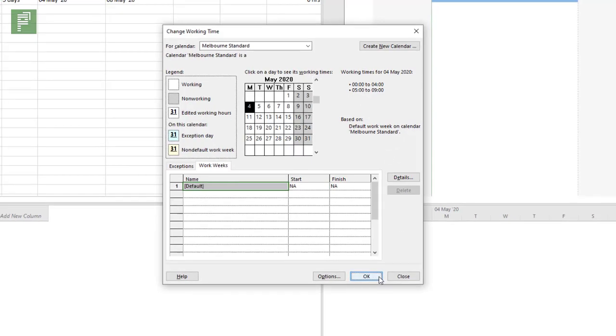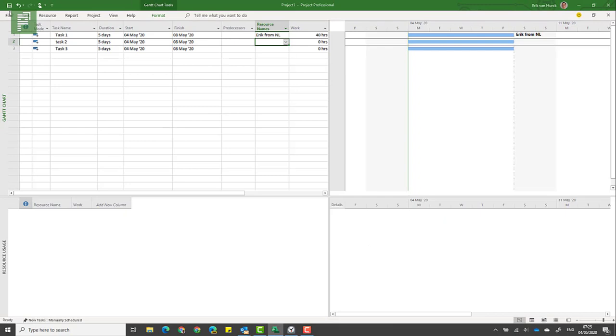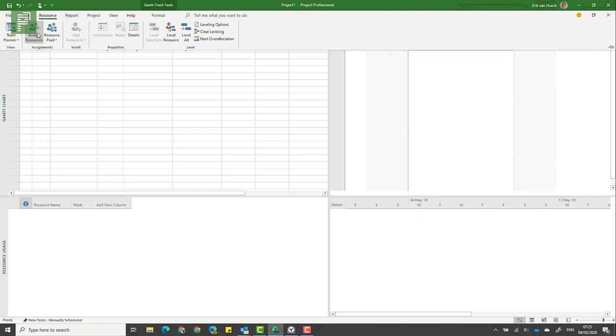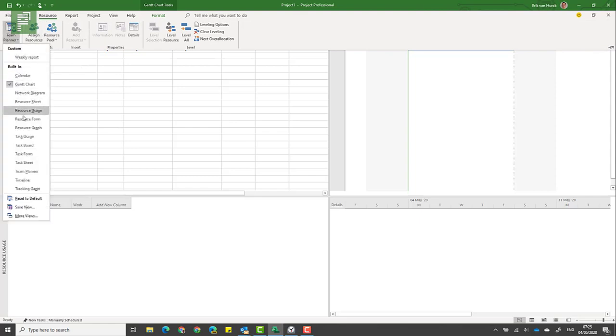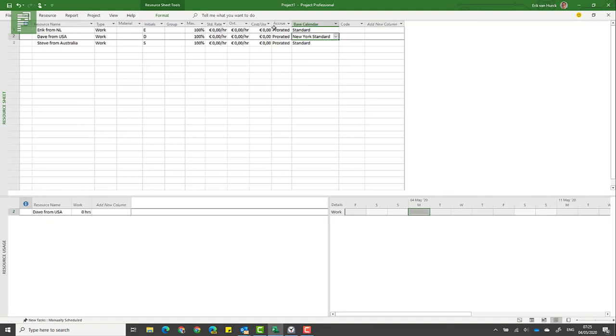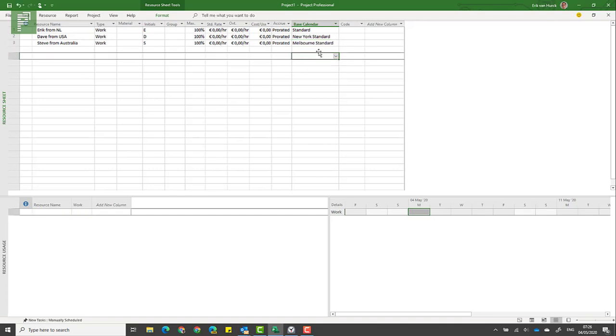There's a little trick here that's going to happen, but before I get to that, let's change the working time for the resources. I'm going to go to the resource sheet. I've already changed Dave to the New York standard.